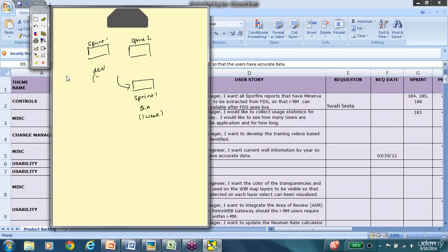In this case, this testing sprint was just a week long. The development sprint, even if it was 2 weeks, or in some cases the development was just 1 week, we broke it down into a development sprint and a QA sprint. So we lagged it by 1 sprint. While sprint 3 was happening, we used to test sprint 2. This way we are not shuffling between multiple projects. We are concentrating on 1 sprint at a time, and we are not sitting idle. We have some sort of work going on, and there's that isolation of development and testing, environment-wise and all that.